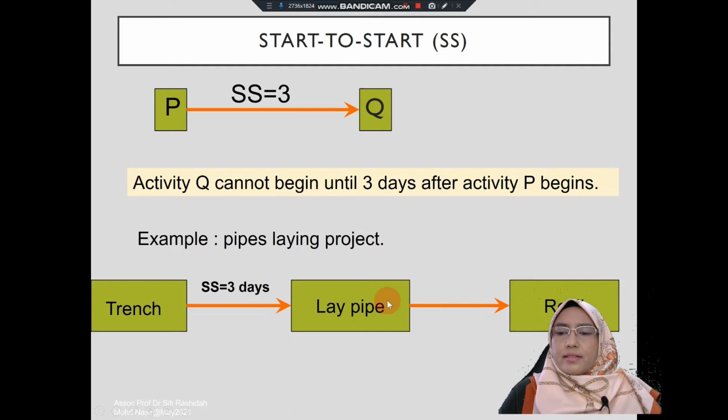And for this activity, this link is also starts to start by 5 days. It means that once the lay of the pipe starts, it needs to wait for 5 days, then only the refill can start.